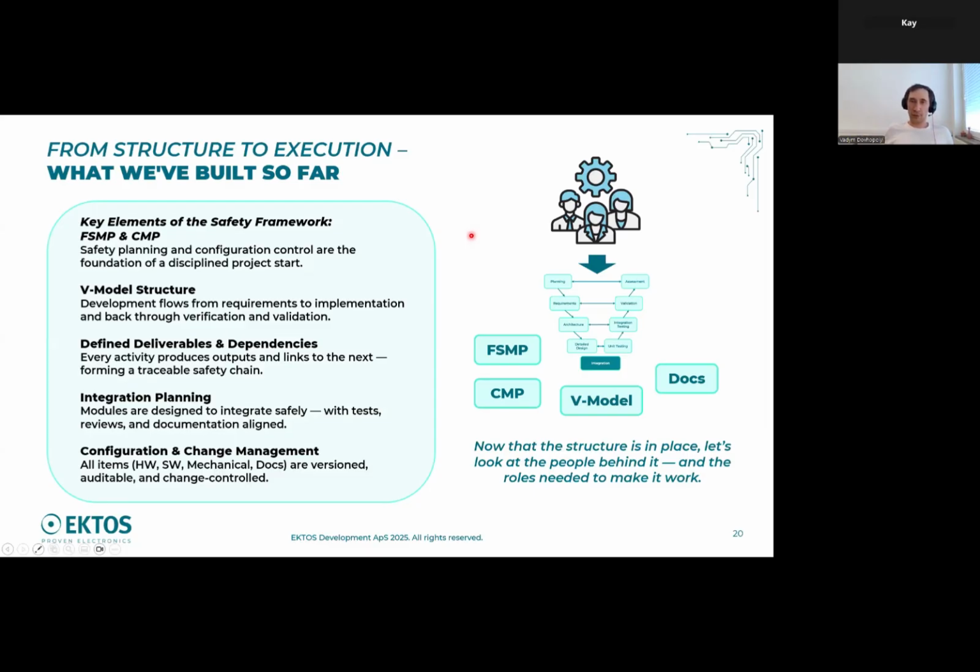You need more roles, and you also have to put some independence in your project. For instance, if you have one person developing code, obviously someone else should do at least the planning of verification of this code. So this is for the project, for the process, what I wanted to describe.